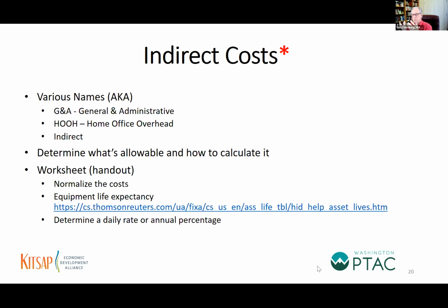After you got that subcontract though, some months down the road, you found that it's going to be more economical because you're in it for the long run to go out and buy them. You don't need to disclose anything to the prime contractor. They've already awarded the contract to you as a firm fixed price subcontract, and that's fine.